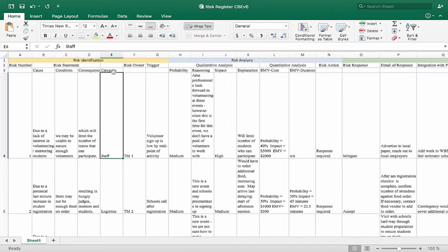Also, in the risk management plan, we did talk about categories, and now what we can work to do is assign each risk into a category, though some risks may belong to more than one category. And we're doing this very purposefully because by aligning risks in the categories, they may be easier to communicate. That may certainly affect better risk analysis, and we may find some synergies in how we work to respond to those risks. So there are benefits to working to group the risks. The other reason that I like doing that is many times your risk list can get rather long, and so grouping it makes it easier for folks to communicate and understand.